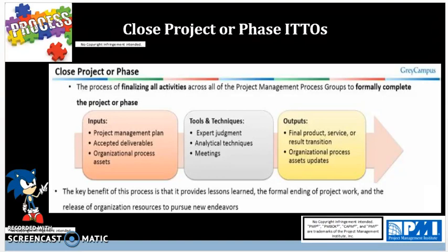So if you're closing out a phase, keep in mind that you have not completed all the project work. Rather, you have completed work for that phase, and you should not release your resources to pursue new endeavors. You need to finish off the whole project and all the phases within that project before releasing the resources. That's really important to know for this exam. They will trip you up on this. You'll need to know the difference between the two.